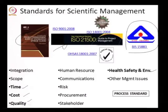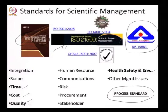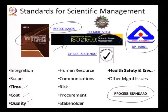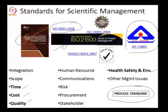You can see that some of the objectives we explicitly defined — time, cost, quality, health, safety, and environment — are all there. Other parts, such as human resource development, are supporting processes that help us achieve these objectives. This is what you call a process standard: if you do things right, the results will be correct. It is not a product standard; it is a process standard. This is also supported by ISO 9001 (quality management system), ISO 14001 (environmental standard), and ISO 18001 (occupational health and safety). There are scientific ways to approach this, and these standards represent a really strong start.